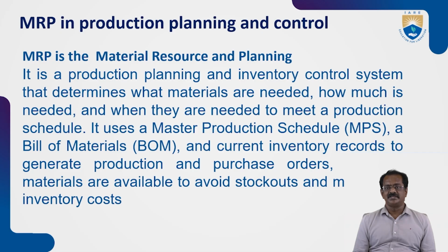The bill of materials is the base for placing the order and to raise the purchase order. Generally, from the bill of materials, there is raising the purchase order, placing the purchase order, getting approval, and paying for that. It has its own administrative timelines. Like getting the approval, the person might not be available, he might be busy or on leave, or for some other reason it will be delayed. So that lead time needs to be calculated when the order is placed.